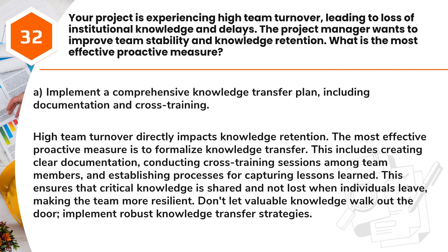Answer: A. Implement a comprehensive knowledge transfer plan, including documentation and cross-training. High team turnover directly impacts knowledge retention. The most effective proactive measure is to formalize knowledge transfer. This includes creating clear documentation, conducting cross-training sessions among team members, and establishing processes for capturing lessons learned. This ensures that critical knowledge is shared and not lost when individuals leave, making the team more resilient.